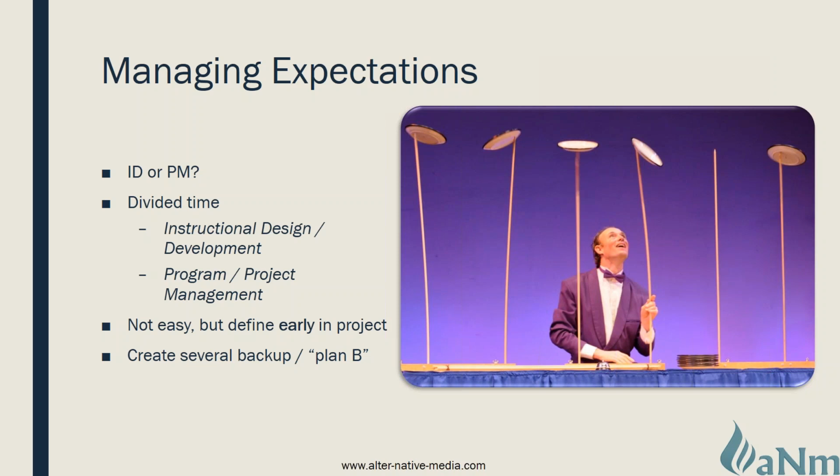Yep. So as we talk about pre-planning, understanding your particular methodology or roadmap or plan is key in all of these. And whether or not you have to manage the project, you still have to deal with various moving parts as well, like the SME or getting feedback or managing their expectations. So I always suggest making several backup plans, or plan Bs. For instance, time-wise, schedule-wise, if you're working with SMEs whose personality you know, or you know stakeholders are going to have a lot of input, which can actually help your course or content, understand that's going to add time in the overall development process.